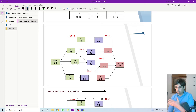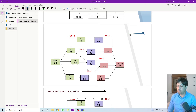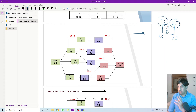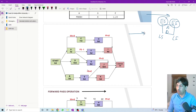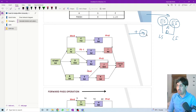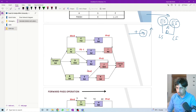It's becoming familiar that we go from left to right to calculate the early time. Each activity box contains the activity name, duration, early start, early finish, late start, and late finish. When moving forward, we keep adding — we look at the heads of the arrows to know how many options we have. If we have more than one option, we calculate all of them and select the highest value.